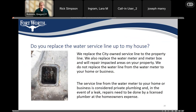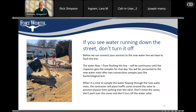Note that we will only replace water services up to your property line and we don't make any improvements onto private property. Flushing the water line is an important step in putting the new water line in service. If you see water running down the street, it could be that the inspector is getting water samples to test and ensure no bacteria is present in the new line — don't shut it off, that's part of the construction process.